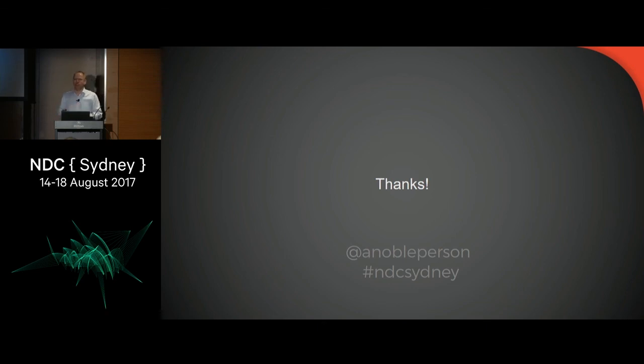It's sort of a combination. Some developers will think of an idea or talk about an idea, and some developers do it on the side. But things which are a bit bigger, like turning our acceptance tests into parallel tests, we try and carve out time for. It's a mix of priority for us and priority for the product owners. If we can really show value to the product owners, then we include it. If it's something that just makes our lives a little bit easier, but product owners may be a little less excited about it, then we may do it as a hidden thing, outside hours or as a background task.